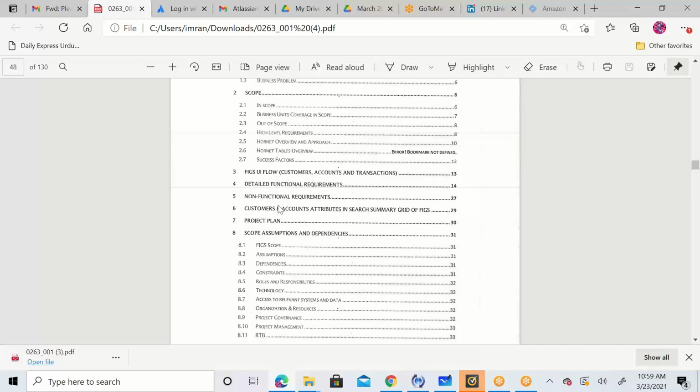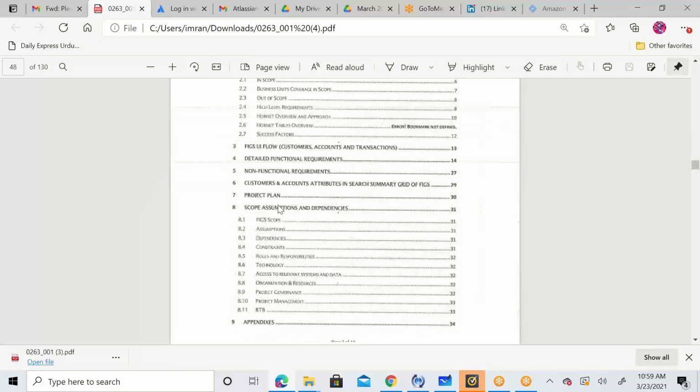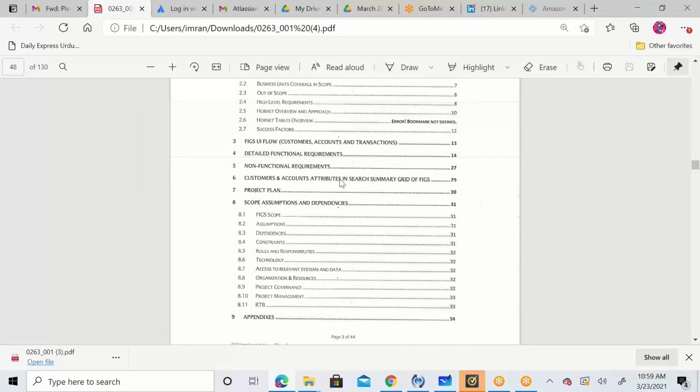After that, you will have the non-functional requirement section, where you will put down all those non-functional requirements: privacy, secrecy, authentication criteria, maintenance criteria, speed of the system, archiving method, all those things. But you are not going to write down the information on all those non-functional requirements yourself. You're going to sit with your developer, and he or she is going to define how these non-functional requirements are going to be built.